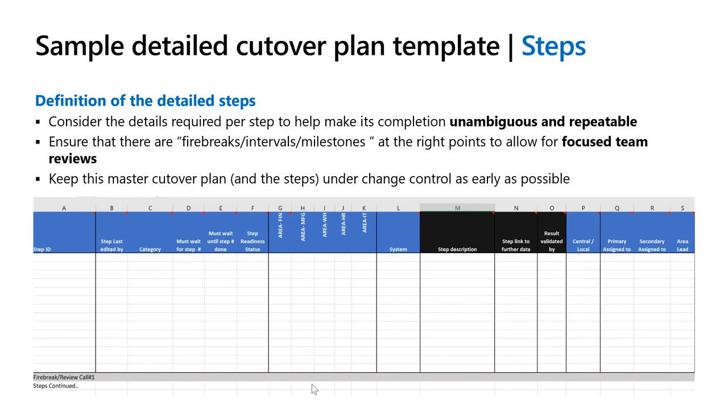If this step is complex and it requires 5 or 6 very specialist technical things that somebody's going to do in the background, you may not want to write all 5 steps here, but you may want to put a link to the document that defines it in the step here, putting all of that under change control and formally documenting it. The rule being that for the final cutover, there should be nothing that you're doing to the system that is not in this plan. Right? Everything you're going to be doing for the cutover should be defined in this step-by-step definition. Right?